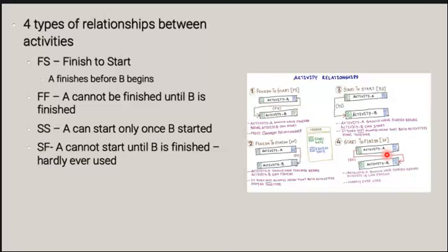It's really useful only for backward scheduling, so if the scheduling of your project is worked backwards from the end date towards the beginning, which is probably not the best thing to be doing. Projects that have done this in the past tend to be delayed. Real projects should do forward scheduling and tend to use finish to start, start to start, and finish to finish relationships.